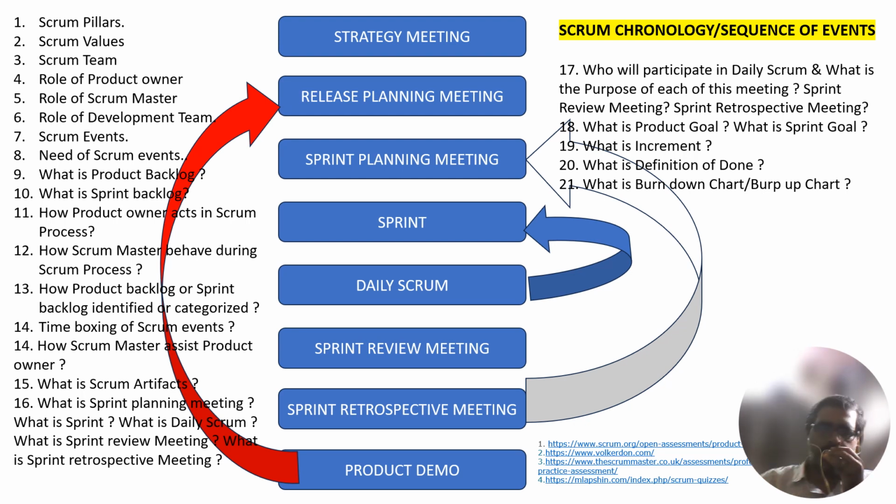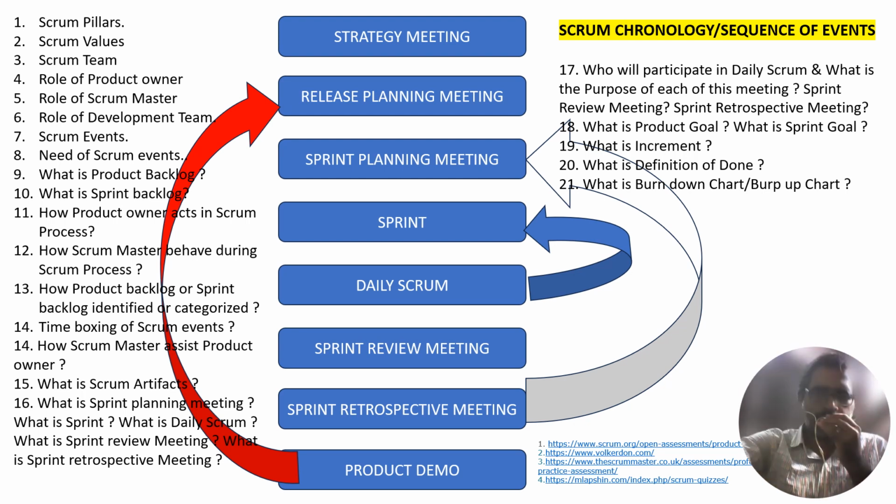So there is no team manager or project manager kind of role in the Scrum theory. The project manager is not a part of the Scrum team. The Scrum team is small. It is small enough to remain nimble and large enough to complete significant work within a sprint. Typically 10 or fewer people are required.